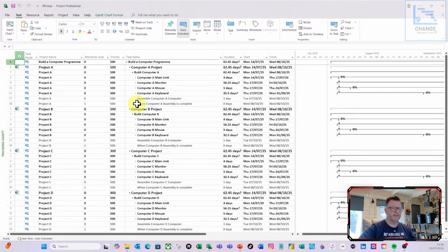So before we look at the resourcing, there's one thing here: I'm the PMO and I've been allocated 2 days a week. So how do I represent the PMO in here? Well, it's the same as the project manager. So I'm going to stick myself at the program level, supporting Jane Smith, our project manager. So 2 days a week is 40%.